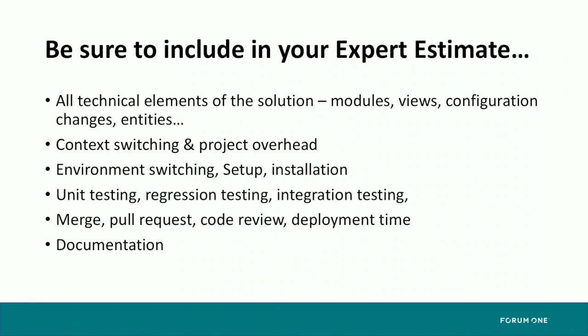So for me, if I'm asked to do an estimate, I usually add in 30 minutes just to find out what I'm supposed to be working on. Because I was working on something completely different on a different project for a different client up until 11 o'clock. And then I'm supposed to work on this new feature on a different project for a different client from 11 to whenever. It's going to take me a little bit of time to go to the bathroom, get a cup of coffee. Oh, and now I have to figure out where that ticket is and what they really want there. So there's this context switching that's a bit of an overhead.